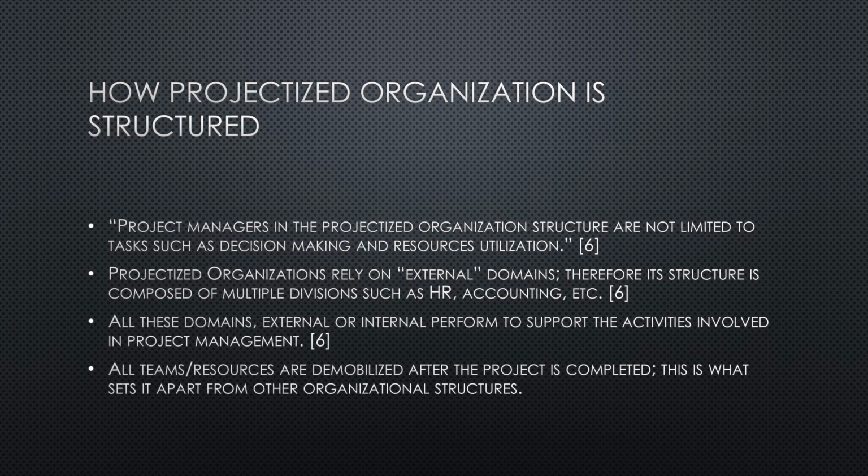The project manager is responsible for all decision making, but they're also responsible for assigning tasks to individuals, tasks to teams, managing funds, and managing the resources of the project. A projectized organization relies on external domains. It pulls resources and divisions from those to create its own domain for the time length of this project. And often this is taken from human resources, accounting, administration services.